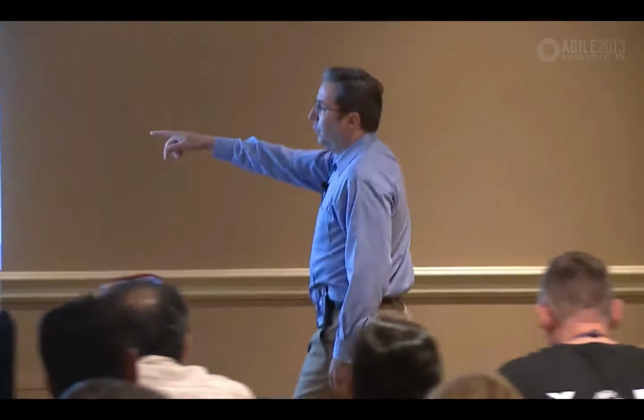Right size. Well, I think most people are familiar. The average team is supposed to be, on average, 5 to 9 people, which makes for a good Agile team. It's a guideline. It's not a law. You can have smaller teams. You can have larger, but it tends to be the sweet spot.